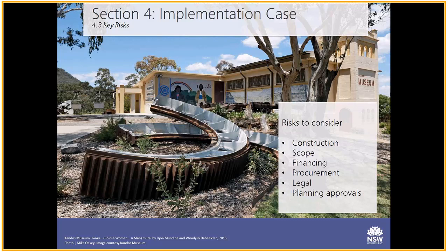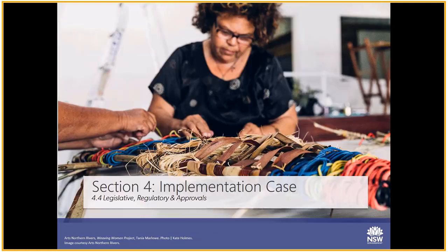The identification of risks may be undertaken as a desktop exercise for a relatively straightforward proposal. For a more complex proposal, key risks may need to be determined through workshops and stakeholder interviews. In this business case, you will find a table which will assist you in laying the risks out clearly.